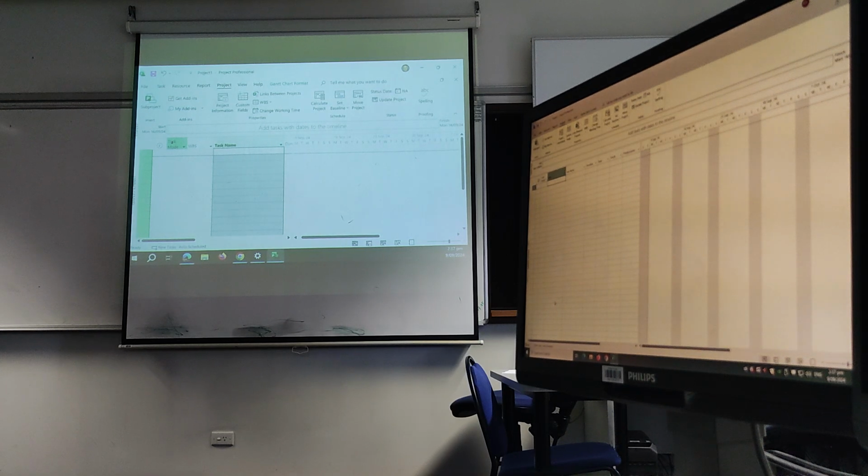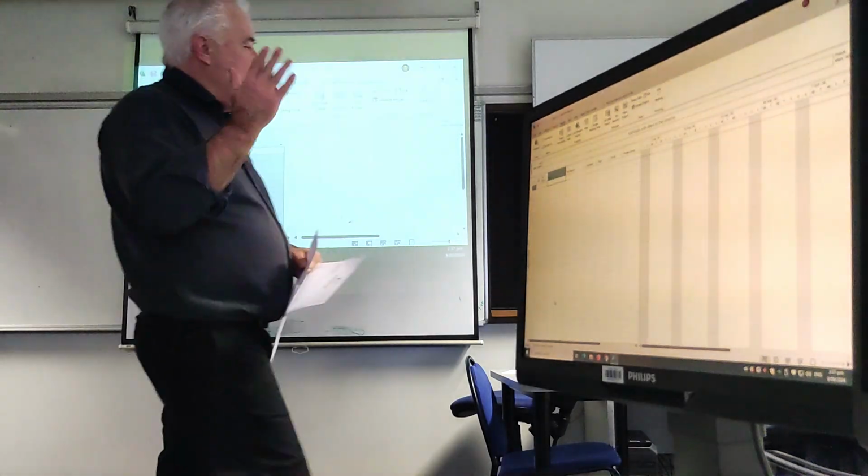So now your program is going to be inadequate. We didn't allow for that time, so you're going to run over time. You haven't allowed for the cost of that curb and channel. And so therefore your budget's going to look pretty sick as well. Okay, so it's important that you break it down and break it down again.